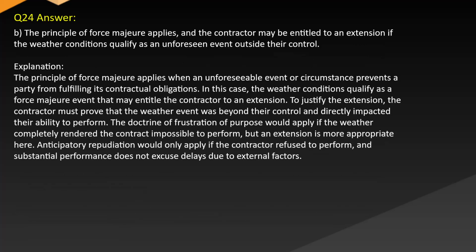Answer. B. The principle of force majeure applies, and the contractor may be entitled to an extension if the weather conditions qualify as an unforeseen event outside their control. Explanation. The principle of force majeure applies when an unforeseeable event or circumstance prevents a party from fulfilling its contractual obligations. In this case, the weather conditions qualify as a force majeure event that may entitle the contractor to an extension. To justify the extension, the contractor must prove that the weather event was beyond their control and directly impacted their